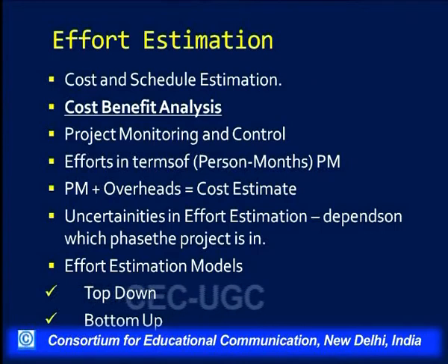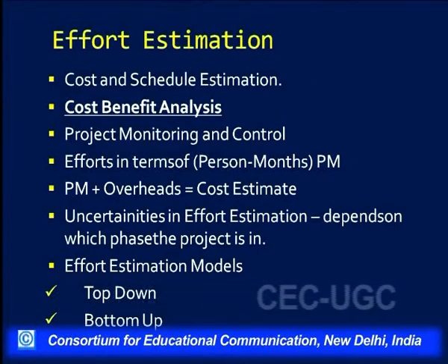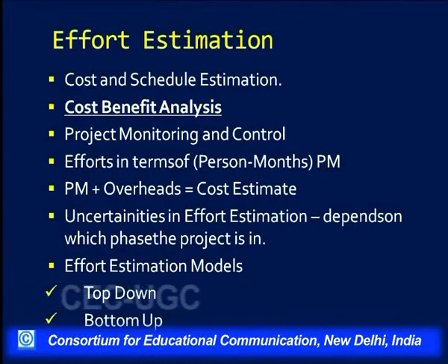Whereas if a project has been completed and you are asked to calculate the effort which has gone in, that will give you the most accurate idea of how much effort has gone into that particular project. So basically, effort estimation can be done at any stage in the project life cycle, and the later it is done, the more accurate the results will be.